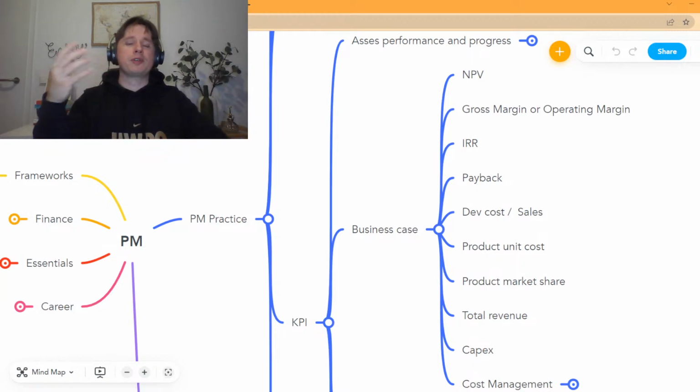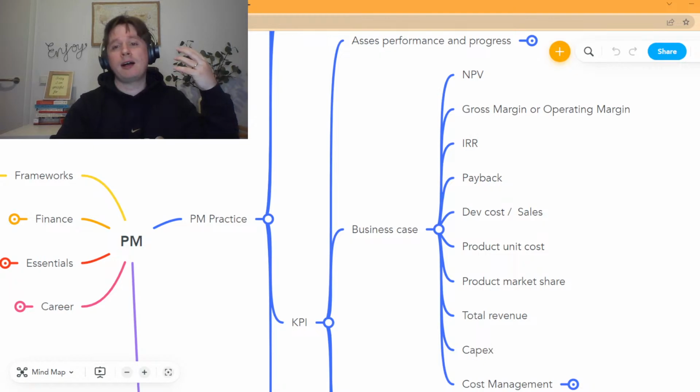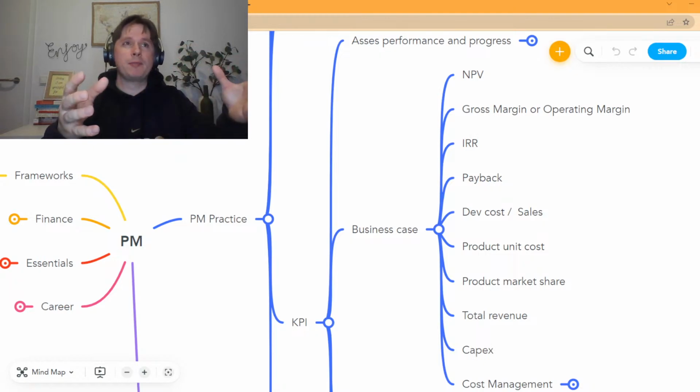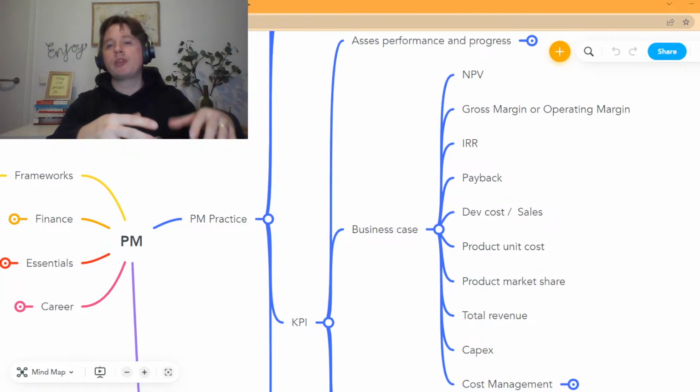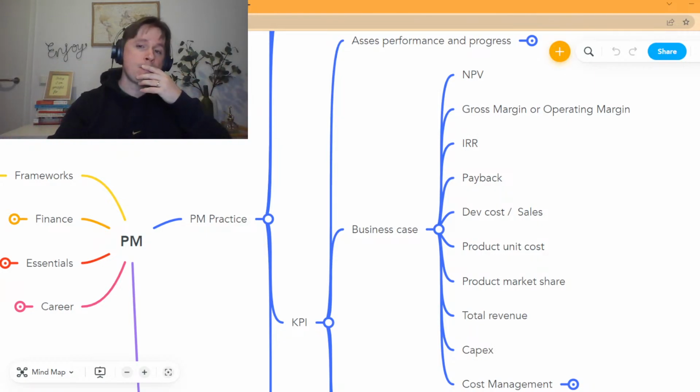Here it's also one of the ways that you can assess the risk of the project and how far you are from your WACC. But you also can have a KPI for your payback, meaning that for the amount of money that the company is investing in the project, how long it will take to get this money back. That's what payback means.